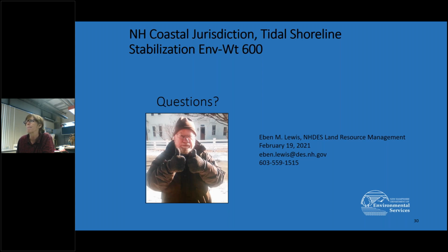If the work isn't in the tidal buffer zone, previously developed tidal buffer zone, or any tidal resource, then it wouldn't require the vulnerability assessment or the coastal functional assessment. The only areas where those two assessments would be required are in our jurisdiction, which would be the previously developed tidal buffer zone and undeveloped tidal buffer zone and tidal resources. And most notably, the vulnerability assessment is required for all projects in tidal resources, whereas the coastal functional assessment is only required for minor and major impact projects.